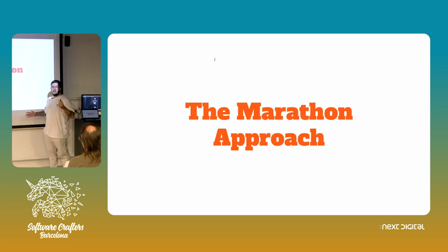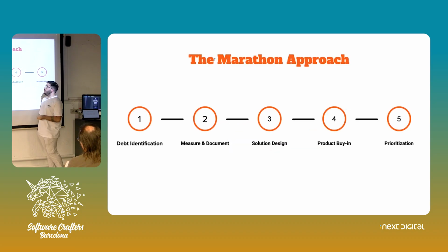Is this some state-of-the-art revolutionary planning process that we discovered? No. It's a super simple one of 5 steps. This can be used for either low product features or low requirement product features, as well as the deep ones. So it's basically a small increment approach with a plan split in independent phases, with major milestones at the end of each step, that is able to simply slide some of that work into each sprint, and you don't affect delivery. So it's nothing super complicated, it just takes some work.